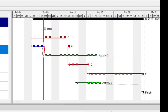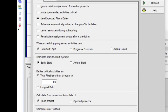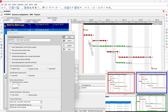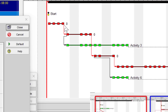We have this example which I think 50 to 90 percent of my planner colleagues might not have used before — the calculated start-to-start lag. This one has some secrets, so let's expose it step by step. This project starts 3rd of March and finishes 1st of April. We have finish-to-start between activity 1 and activity 2, and activity 1 and activity 3 have no relationship.